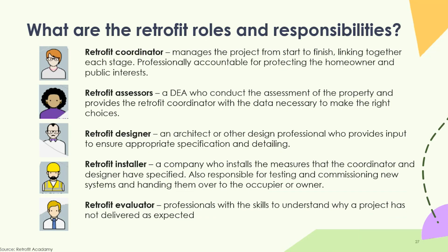So these are some of the roles. You'll see things like the coordinator is probably the most important one. Assessors, so people that are conducting that kind of super EPC at the start. Designer and the installer. Those are probably the most important ones there. A lot of people like to have the coordinator be quite separate from their assessors, designers, and installers. So often people will get a turnkey in, for example, a contractor who will install things, and people who are installers tend to also like to be designers as well, because they don't like following other people's designs for various reasons.